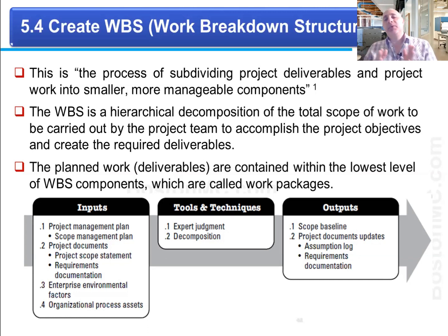So for example, if you had, let's say, a delay in one of the tasks or one of the activities, then you can probably have a negative float at that point, and the negative float could trigger a red color in one of these boxes. So in a way, it allows you to be able to drill down into which part of your project is really having a problem, rather than looking at the whole project as one piece. It makes it easier to manage.